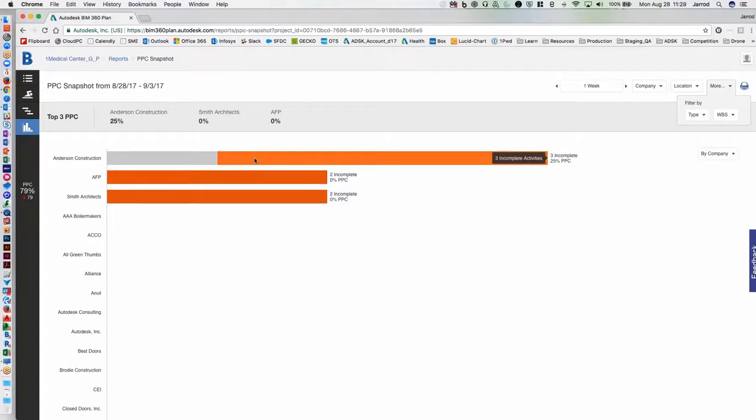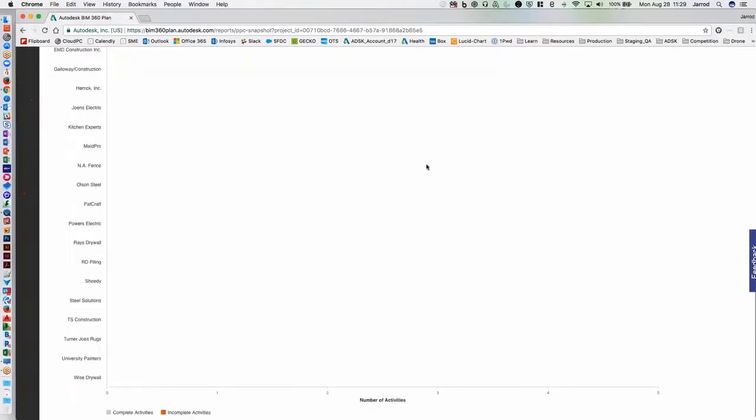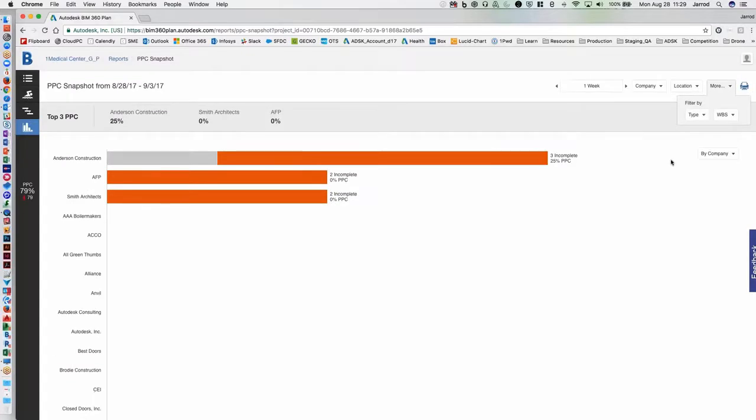Again, the idea here is that you may have a lot of activities that are in the pipeline that have yet to be completed. So you have to take a look at this information with a bit of a grain of salt and understand, are they still on the project with a lot of incomplete activities just because they're in process? Okay, that's just kind of a best practice, but you can either click into one of these and see the actual incompletes, right?